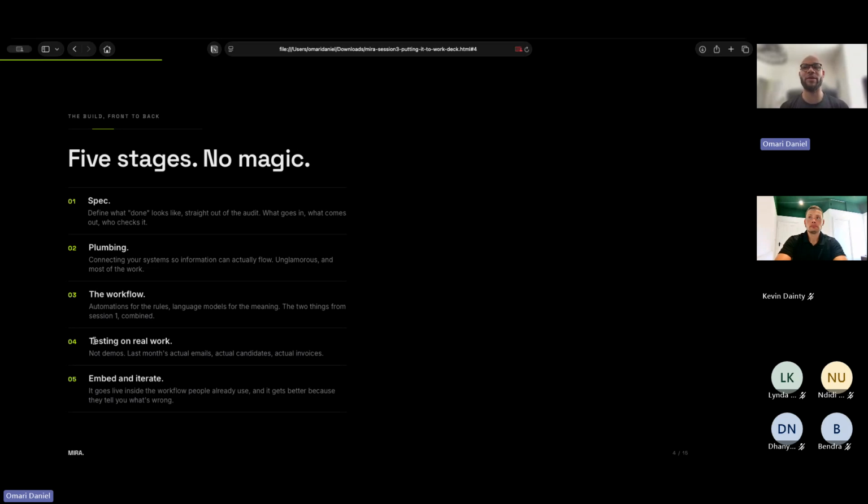I've run into this issue with people before as well, where there is not an understanding of what testing really even means in the context of software development. The best way to look at this is as an ongoing software development exercise that your business is taking on. So testing phases are super, super important. I would potentially even argue that you should plan in 2 or 3 testing phases at different stages of the build for whatever solution you're building.